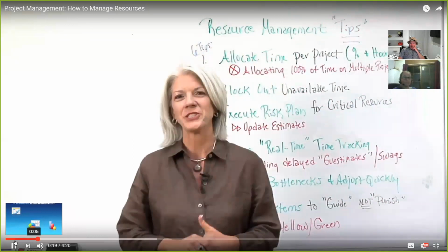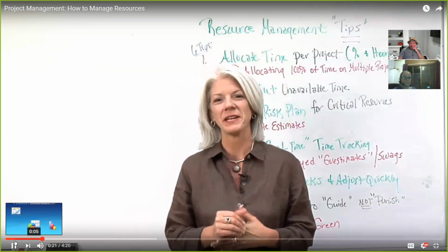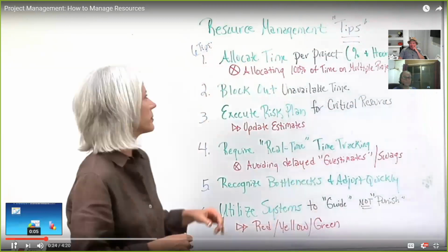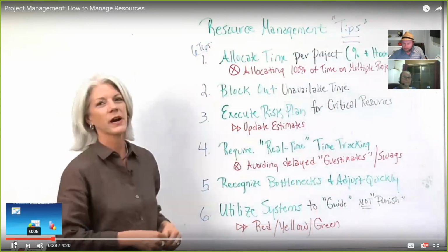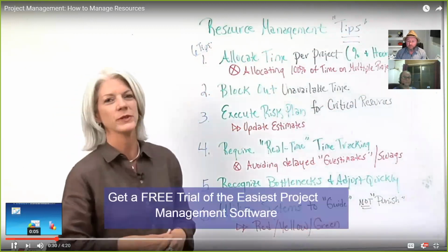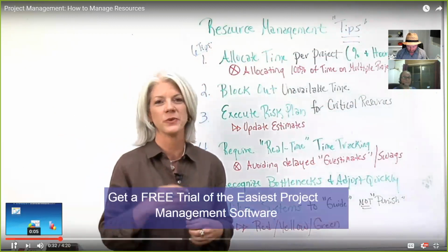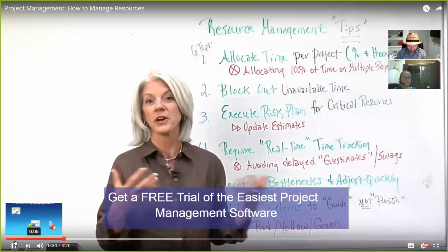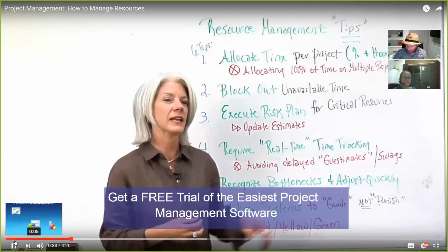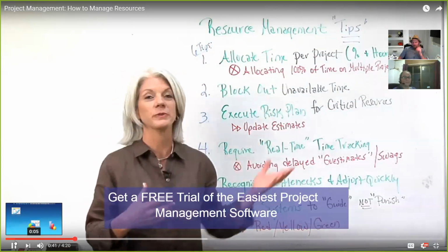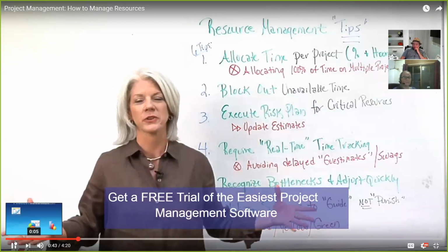What I want to share with you today are 6 tips that I found helpful in managing resources for my project. Number 1, allocating time per project. So many times we have resources or people who are assigned to not only our project, but other projects. And the failure becomes when we try to allocate them 100% on our project when they're spread across multiple projects.